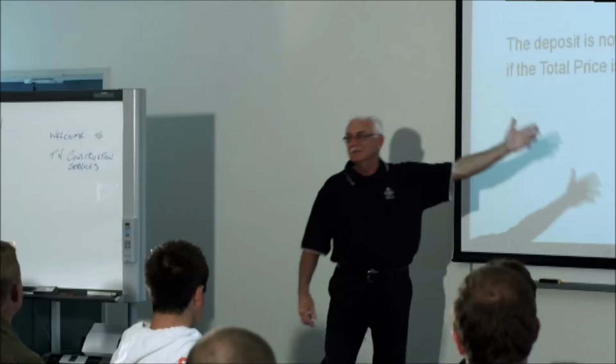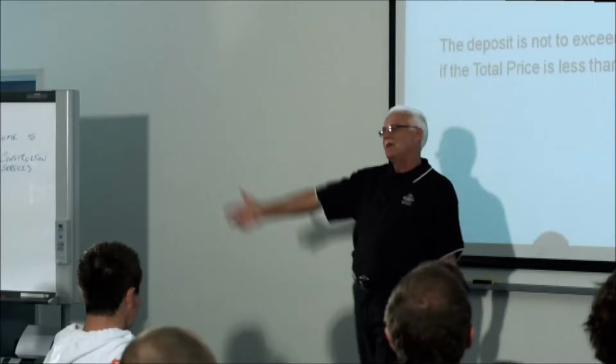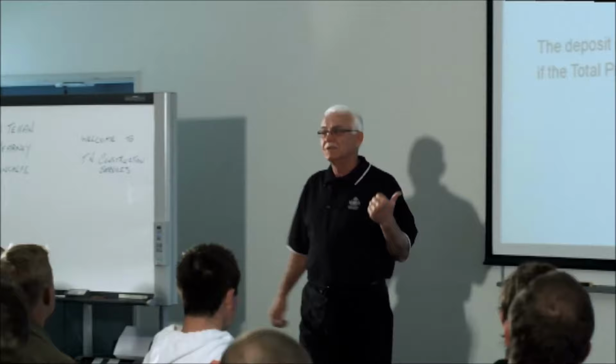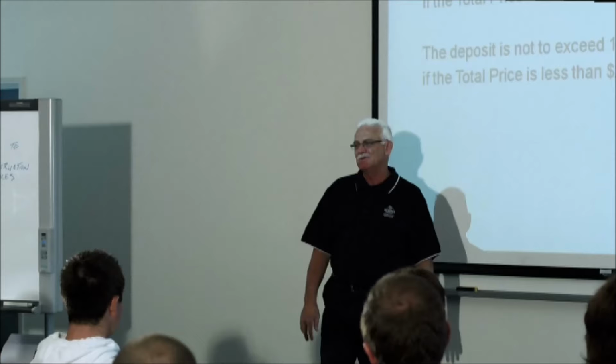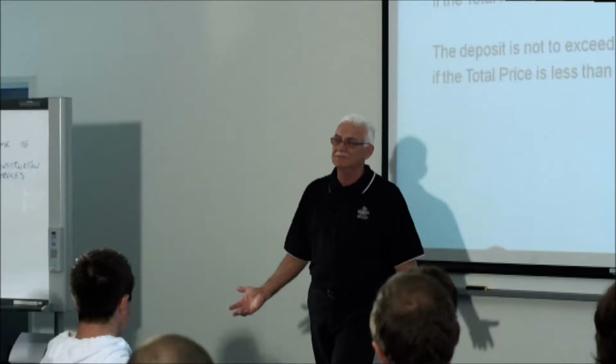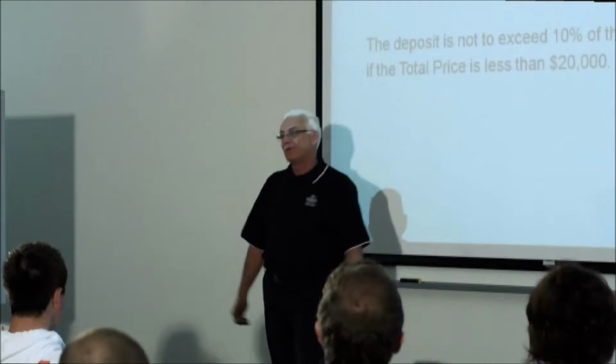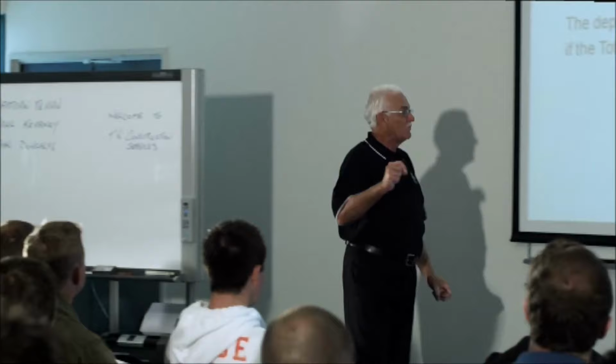Builder ordered the material, it went onto site, there ended up being a dispute. Fair enough, the builder had a contract in place, did the right thing, had a contract information statement, did the cooling off period, did all of the right stuff, except he took too much of a deposit because he was strapped. The judge said, sorry, you're wrong. He lost. No, it wasn't me, but he lost because he broke the laws of the Domestic Building Contracts Act. So that one really is important.